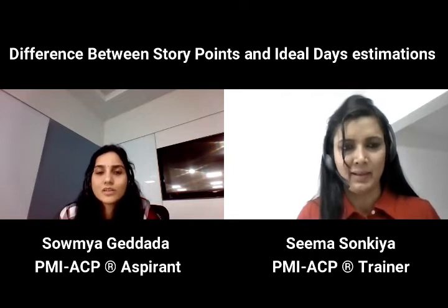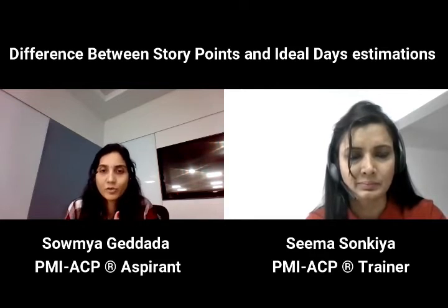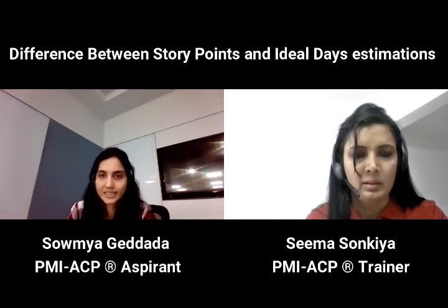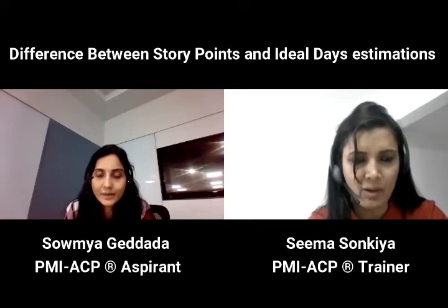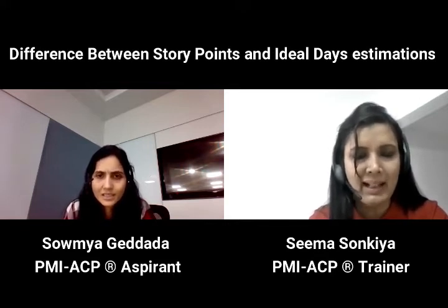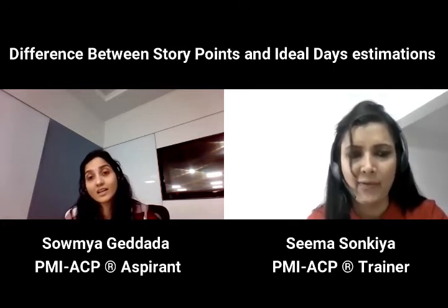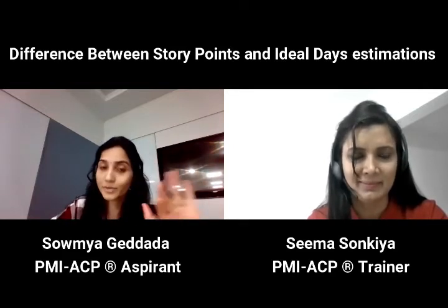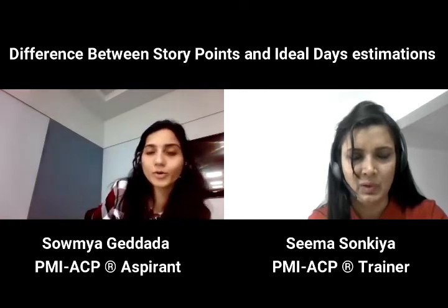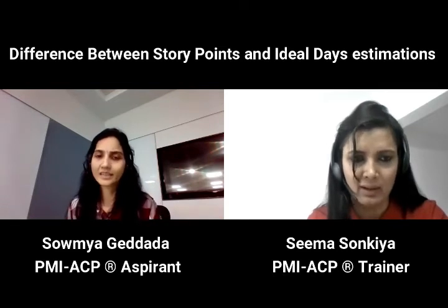So as we see in agile estimations, we do first sizing and effort, and then duration. Sizing can be directed towards getting the duration. For example, when we are estimating in story points at the product backlog level, we can collect the velocity and directly get duration. We are not considering effort here, because we don't know who is going to work. Suppose we don't know who is going to work on a particular iteration level requirement, then the team finds their solution and picks the work.